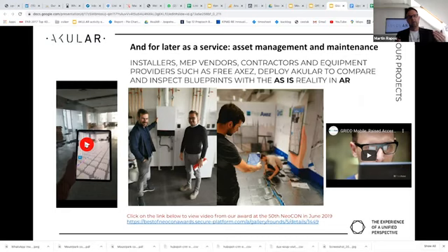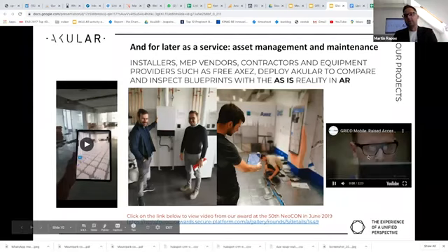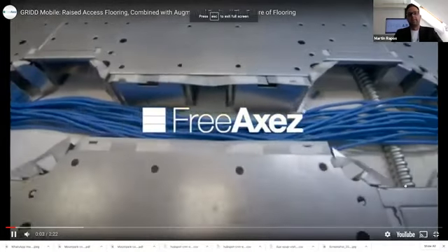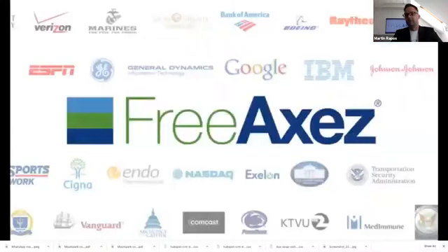Because if you install something and you take a picture or video just like this, comparing how your 3D model is exactly the same as it's being built, so the as-is state is the same as the 3D, you are saving a lot of back and forth, and obviously any changes to your 3D model. So that's also useful for maintenance purposes in the future.